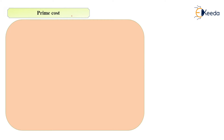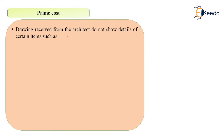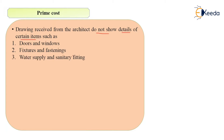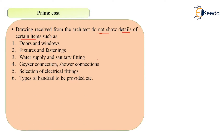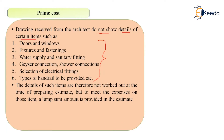The next term is Prime Cost. Drawings received from the architect will not show details of certain items such as doors and windows, fixtures and fastenings, water supply and sanitary fittings, geyser connections, shower connections, and selection of electrical fittings. Since these details are not available, a lump sum amount is added into the estimate to meet these expenses, and that is your Prime Cost.